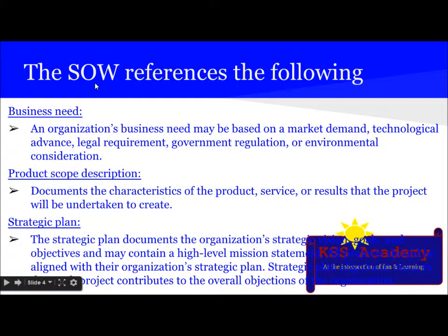Second, the statement of work references the following. It references business need, product scope description, and a strategic plan. You can remember this as a short form BPS. Business need for B, P for product scope description, S for strategic plan.